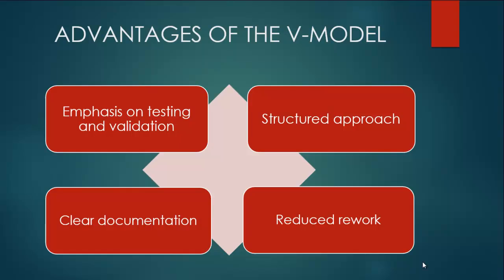Then it has the advantage of reduced rework. Reduced rework simply means that the likelihood of re-embarking on such a project is reduced. Why? Because the V model emphasizes testing and validation at each development stage, and this helps to reduce the likelihood of rework.